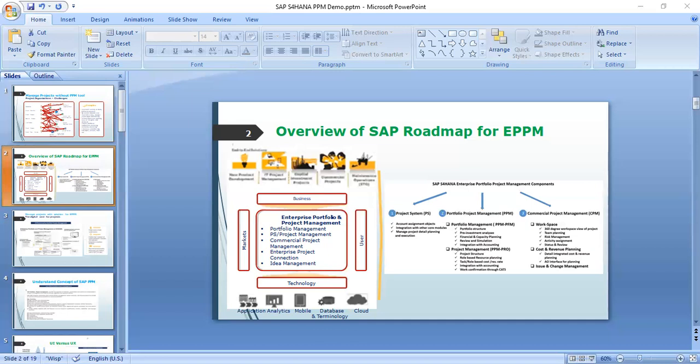For example, kickoff is the first stage for me. All my stakeholders have approved. Then I go with the BBP phase. Once my BBP phase has been approved, I go for the realization phase. Like that, you have to define every stage. One stage depends on the previous stage, so predecessor and successor kind of things. If you want, you can also skip those things, or if you do not want to skip, then once one stage has been approved, you can proceed to the next stage. So this is one key major factor.